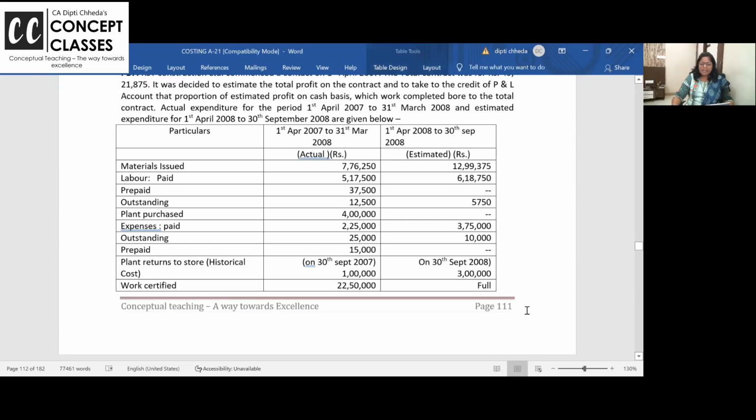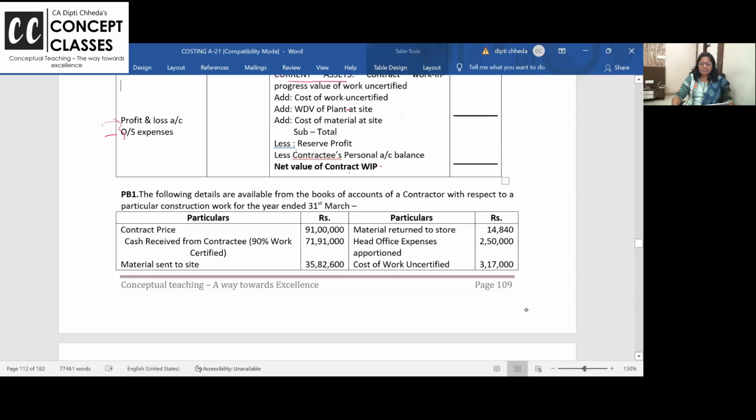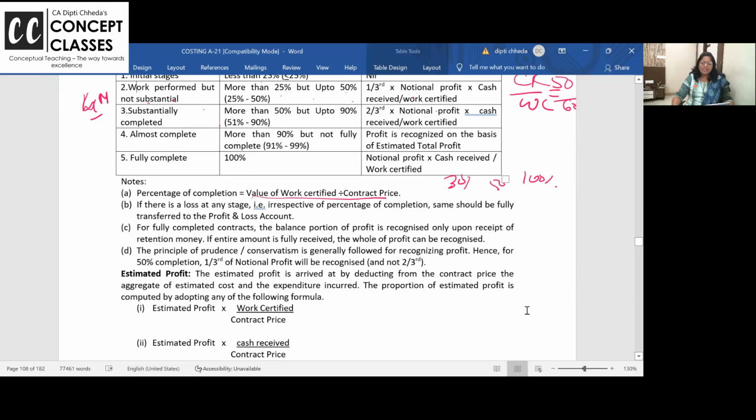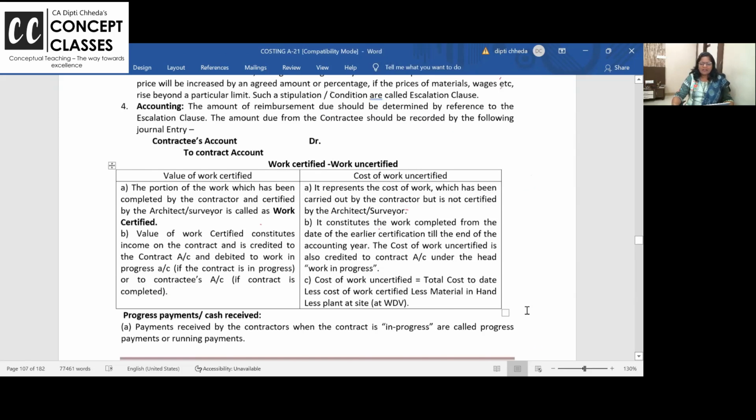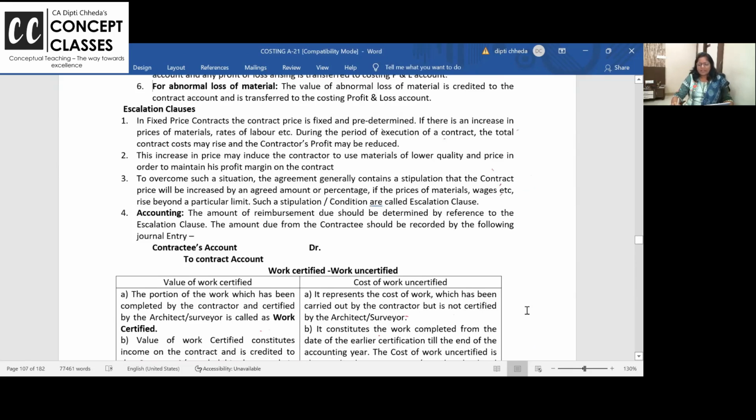Yeah, I was explaining what the escalation clause is. The beautiful clause in the agreement which is made by the contractor and the contractee. Okay, we have told you we will make the G plus 2 house in 10 lakhs. So if the prices go up by 10%, no problem. But if prices go up beyond 10%, till say 25%, then whatever the prices go up beyond 10%, that part, we will take it from you.